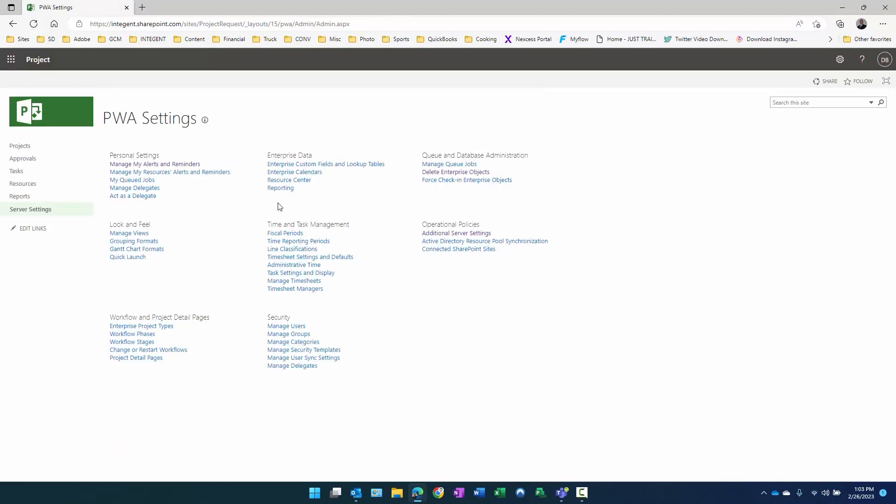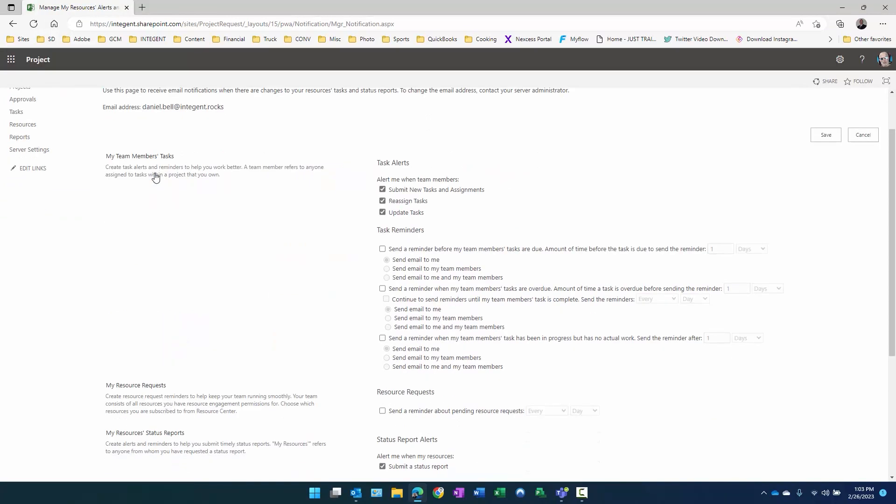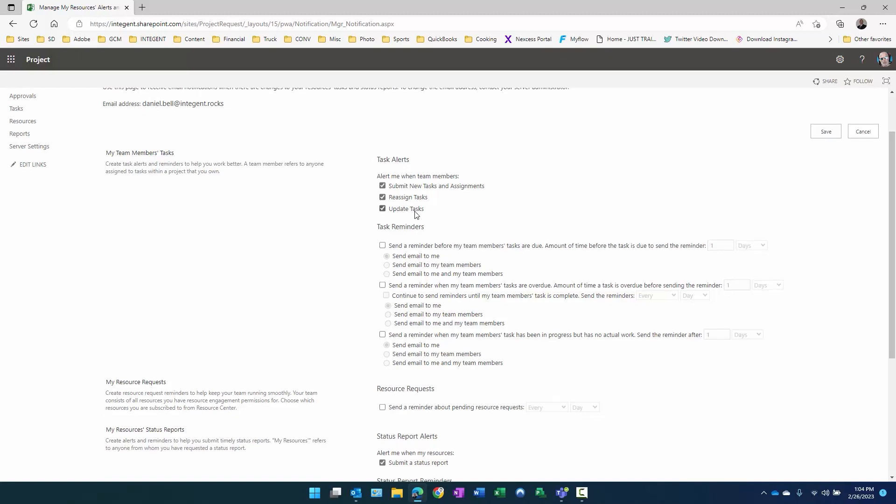What we'll do next is take a quick look at the manage my resources alerts and reminders here. When we look at this, consider for a second what this says: my team members tasks. What does that mean? Here's what it means: create task alerts and reminders to help you work better. A team member refers to anyone assigned to tasks within a project you own, referring to the project manager. I am managing a project. I have on the project resources that are assigned to tasks. When do I want them to get alerts? When I submit new tasks and assignments, probably a good thing. When I reassign tasks from one resource to another, probably a decent good thing. And then when I update tasks. Those are pretty common ones, and that's why they're selected by default.